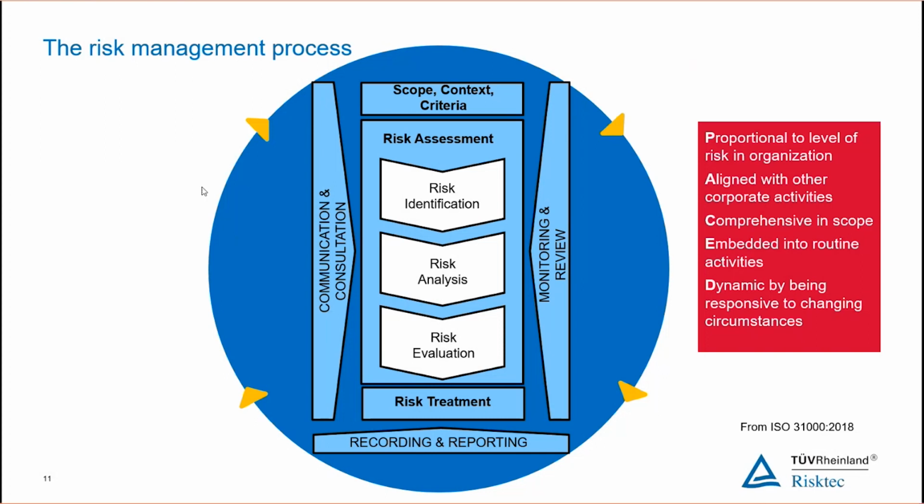But also, the risks might change. There may be things that are introduced into our building where we do maintenance works, users within the building change. So those might introduce new risks. So we have to go back in and look at whether or not the risks that we've identified still remain current throughout the lifetime of the building, which was something I mentioned on one of the earlier slides. So that leads us into this concept of monitoring and review. And as you can see, it's intended to be a continuously updated process, that we are aware of what we have and we continue to manage those things.